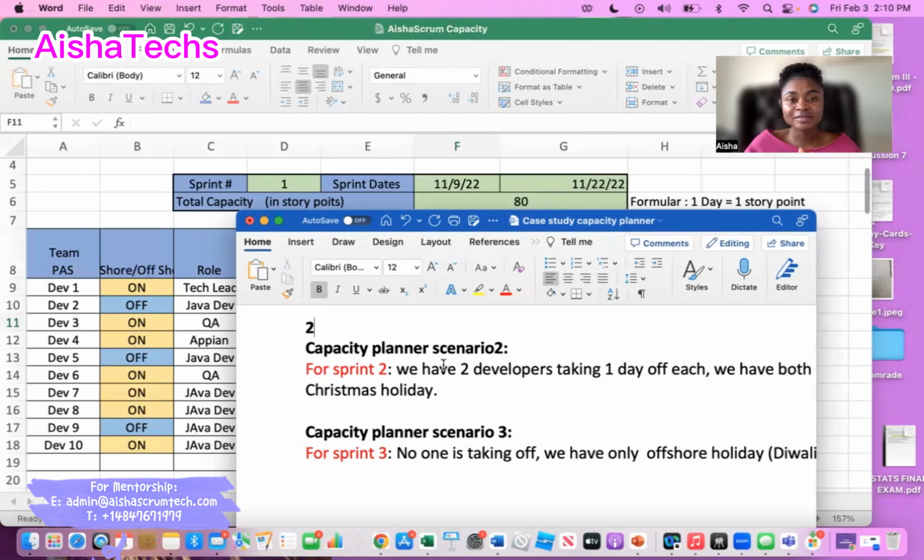What I mean is that your tech lead is such an experienced tech lead that for every interview that will happen in the company, or in a department, they have to participate, meaning they have to take time away from their development work and go support other people in a different department or in your company. So in that case, you can have that tech lead at 80% in your team while they have other commitments outside, beyond your meetings and all. So we have to allocate time away from their support work.